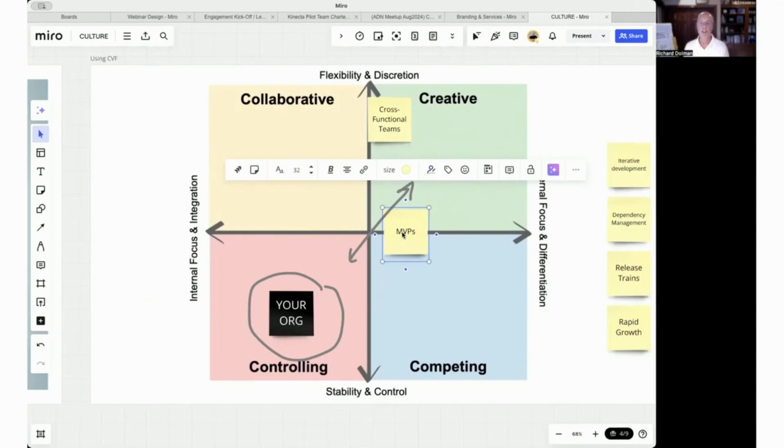One of the control challenges you're likely going to have is if you've got, let's say, a PMO or a part of the organization that's responsible for big project planning or release management, you'll have to negotiate with those individuals as well. Beyond negotiation, what I recommend is actually invite them into the process of defining MVP, at least get some representation in the room when you're doing some of that. So that will start to mitigate some of that tension.